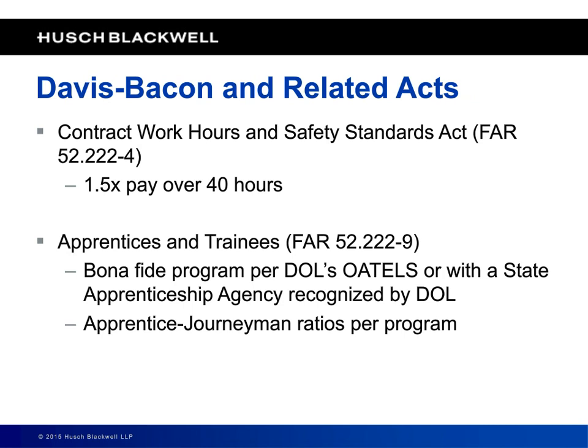All right, so let's start talking about the contract clauses that are going to apply in situations where you are on a covered project. There are about 8 of them, and we're going to go through them all, and then we'll turn our attention to compliance issues associated with them. The first one is the Contract Work Hours and Safety Standards Act. That is the requirement that you pay time and a half for overtime. Overtime is defined as hours over 40 worked during a work week.